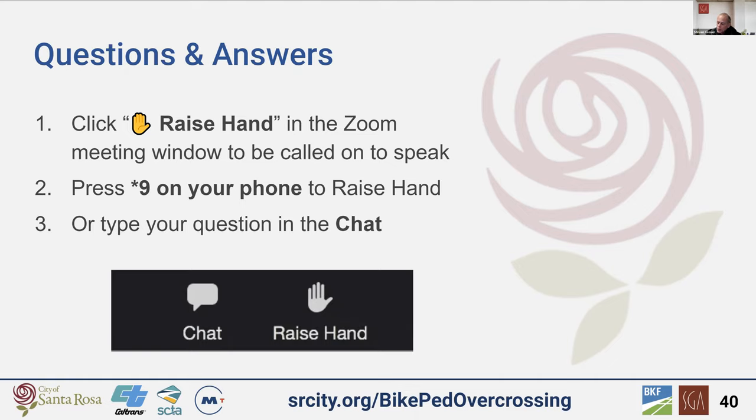And while I'm speaking, I should also just mention on your third point about pile driving, we do not anticipate pile-driven foundations for this project. We anticipate drilled shaft foundations, which would not result in the kind of vibration and pounding that you were talking about. So that's the good news on that.